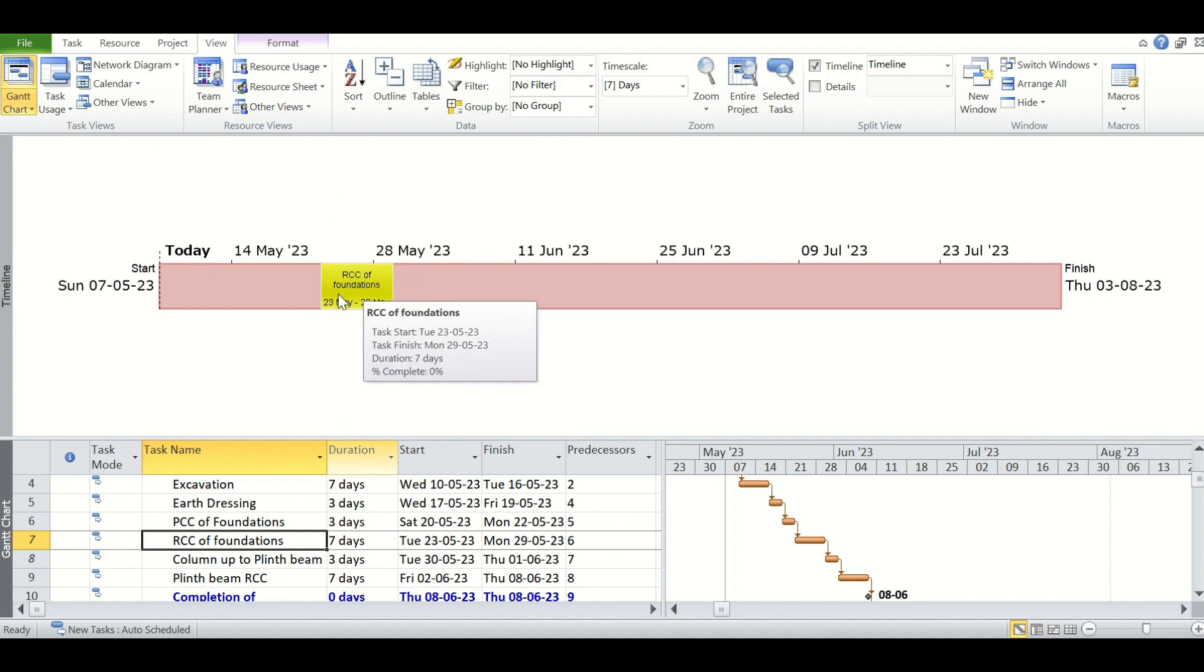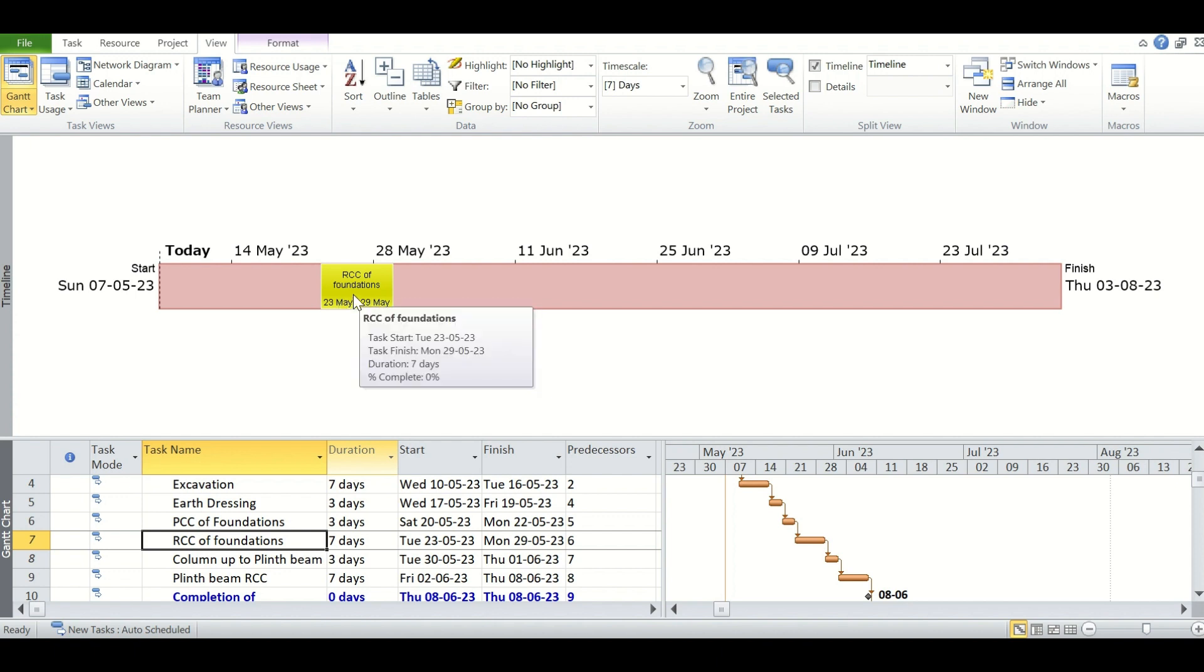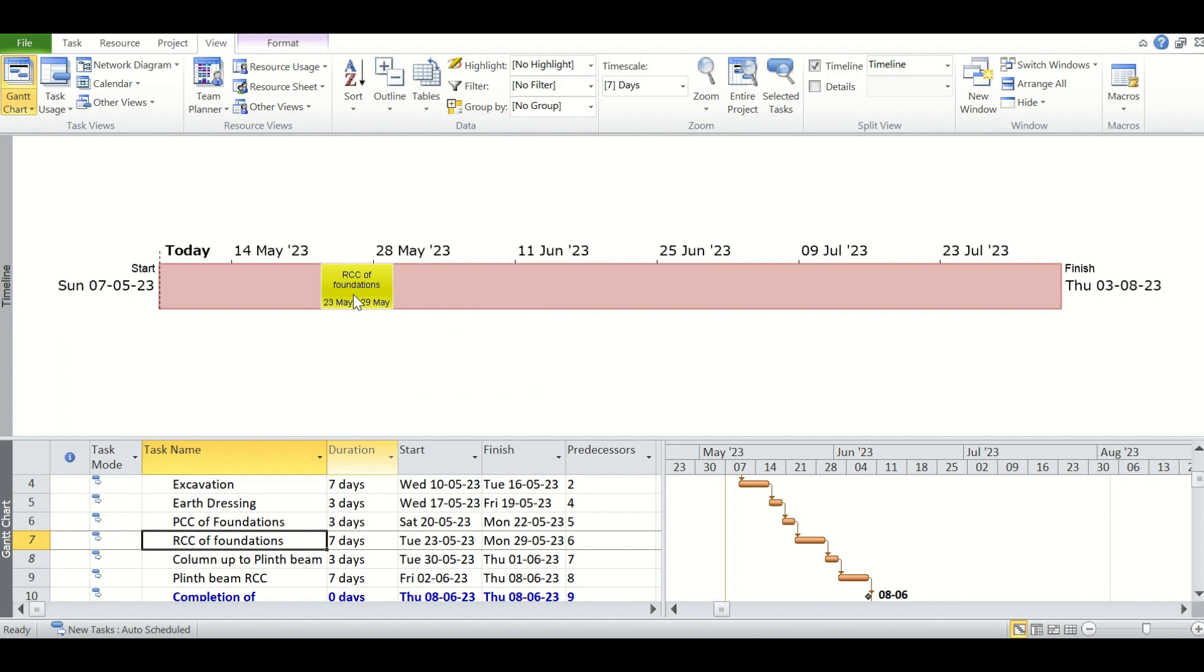That is the RCC of foundation, and while we are pointing our mouse pointer on that, we can see the detail of the task. This is the RCC of foundation task, will start on 23rd May and finish on 29th May, and the duration is 7 days. As we have just created the schedule, the percent complete is 0% because we have not yet tracked the schedule.